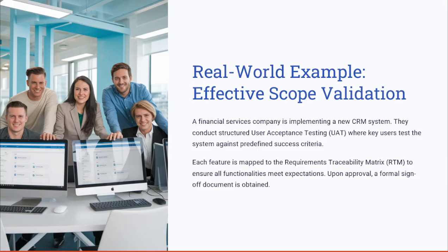Let's now have a look at one of these financial services as a real world scenario. Let's think of a financial services company implementing a new CRM system. To validate the scope effectively, they will conduct structured user acceptance testing, where the key users test the system against the predefined success criteria. Each feature is mapped into the requirements traceability matrix. Each of these requirements was requested by a certain user, department, or group.